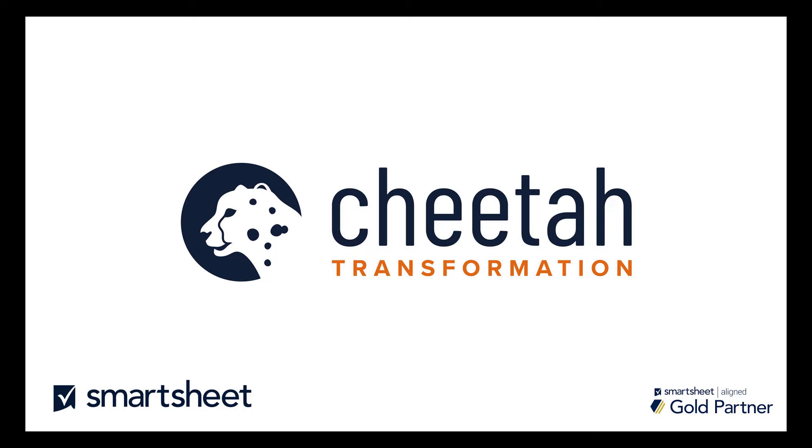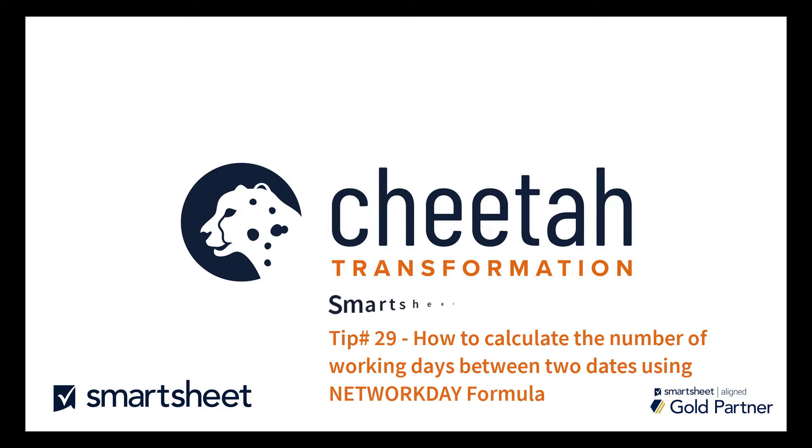Hi, this is Gary from Cheetah Transformation, and this is the 29th Smartsheet Quick Tip on how to calculate the number of working days between two dates using the NETWORKDAY formula.